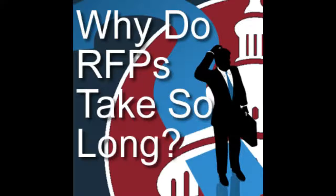But if a 45-day turnaround for an RFP, and they spend 4 days basically thinking about how they're going to address one of the questions. I've done that before. I had a question that was detailed enough that I needed to talk to the program manager, then the lawyer, then the operations security folks, just to make sure that when I answer this, I'm not giving away anything specific to what this requirement does. And I then had to look at how it fits into the overall acquisition strategy, whether it's going to change anything. All of those are valid things to do, but they don't happen in 15 minutes.